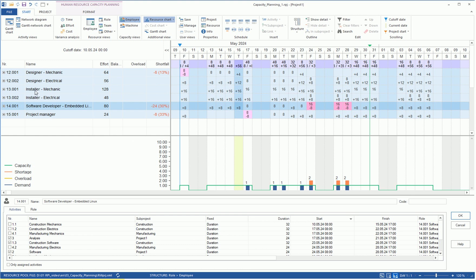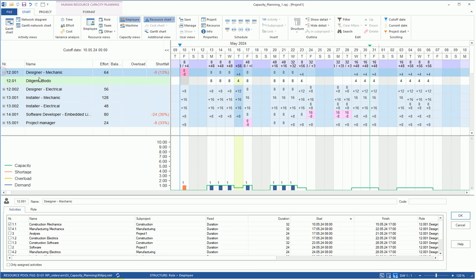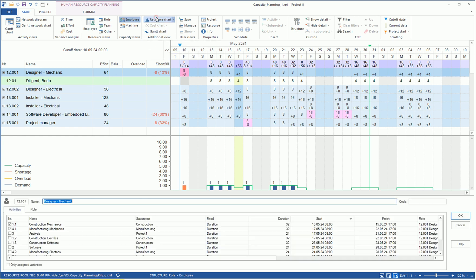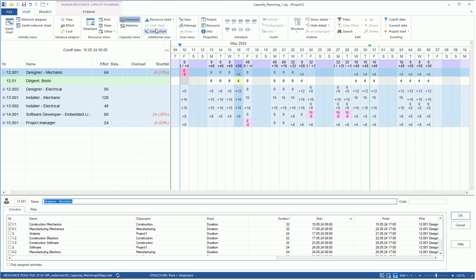We click on Plus at the Designer Mechanic. In our resource pool, we have only one employee, Mr. Diligent, who can be deployed as a Designer Mechanics. Mr. Diligent has a vacation day on May 10th.